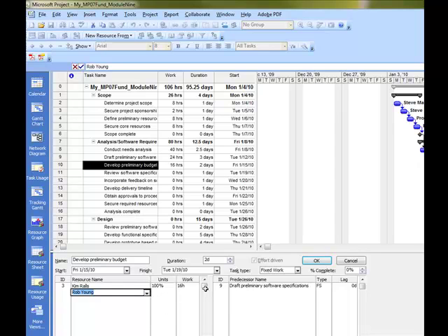Okay, keep in mind all the different variables here. Click OK. Right, and we have it fixed work, so the work is certainly fixed, but notice how Kim Rawls and Rob Young, right, are at 8 and 8, and the duration, right, is now being affected. So it's still 16 hours, but the duration is now taken down to 1 day.